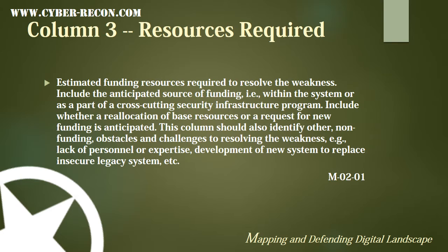Column 3 defines the resources required to fix a deficiency. According to OMB, this is defined as the estimated funding resources required to resolve the weakness, including the anticipated source of funding — i.e., within the system or as part of a cross-cutting security infrastructure program. Include whether the reallocation of base resources or a request for new funding is anticipated. This column should also identify other non-funding obstacles and challenges to resolving the weakness, like lack of security personnel or expertise, or development of a new system to replace insecure legacy systems.